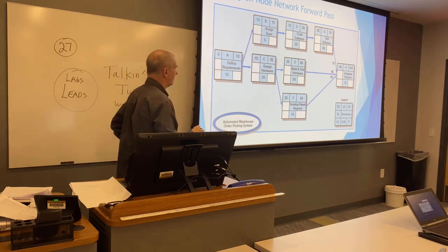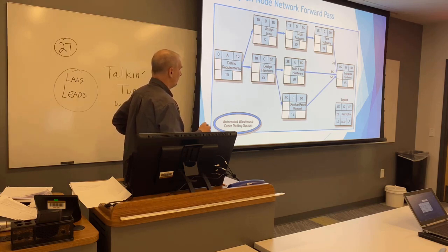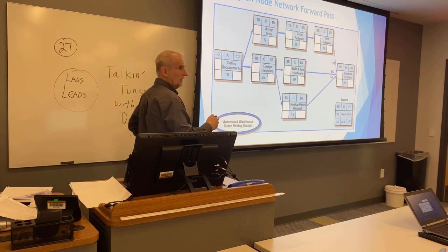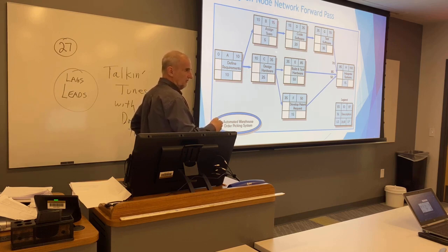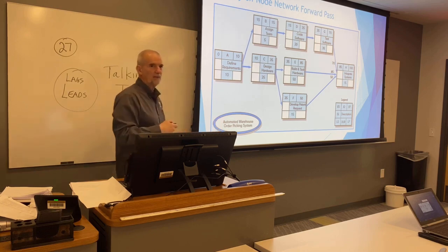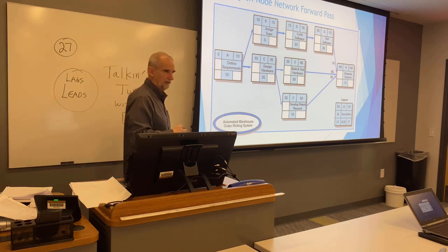Okay, so check it out. We know that to do this, this has to finish, right? So the earliest this can start is day 10. You got it? How do I get this number? Anybody? 10 plus 5. 10 plus 5, that's right. Is this calculus? No. This is like 4th grade math, isn't it? I could go to a 4th grade class right now, they probably could get this. You think so? I'll have to try it someday.